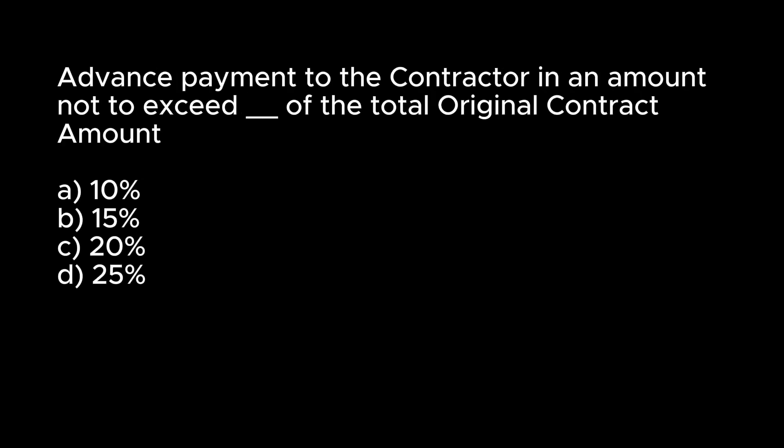Advance payment to the contractor in an amount not to exceed blank of the total original contract amount. A. 10%. B. 15%. C. 20%. D. 25%. Answer: B. 15%.